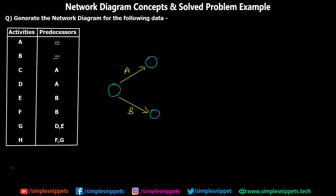Moving to activity C — A is its mandatory predecessor. Since A has happened and we've reached its end node, we can start C from there. Similarly for D, A is also the predecessor. So D also starts from the same node as C. Both C and D start from the node reached after completing A.